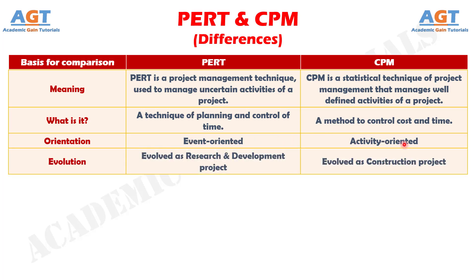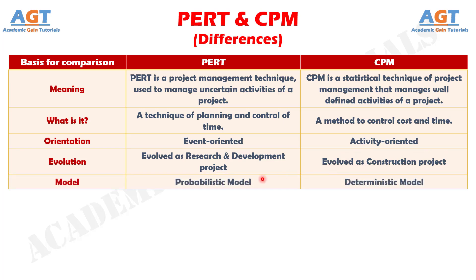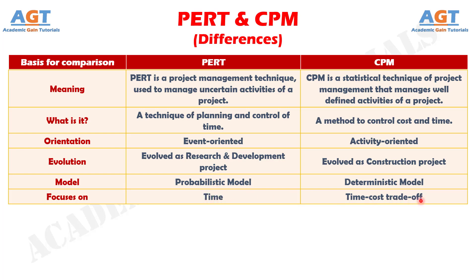Number 4: While PERT evolved as a research and development project, CPM evolved as a construction project. Number 5: A deterministic model is used in CPM; conversely, PERT uses a probabilistic model. Number 6: PERT focuses on time, while CPM focuses on time-cost trade-off.